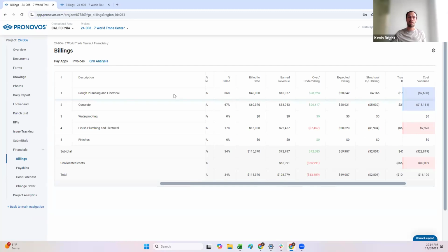So I can say, hey, I'm actually overbilled on my rough plumbing electrical. I'm overbilled on my concrete. Haven't billed on waterproofing at all. I'm a little underbilled on my finished plumbing and electrical. But really, my problem here is my unallocated costs, my general conditions. So I've got to really interrogate, hey, that $39,000 that I've spent on my general conditions, more than I would expect based on this percent complete, is that justified, or is it based on another quirk of the project?